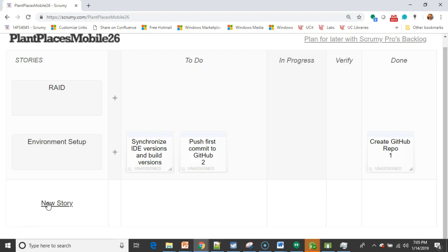That's not really ideal because you can't do 8 things simultaneously. A better approach is to pick 1 thing or 2 things or at most 3 things and fully task them out. Think of everything that you're going to need to do for those. For the other 4 or 5 stories, go ahead and list the story here, but don't bother tasking it out until you're ready to work on it.